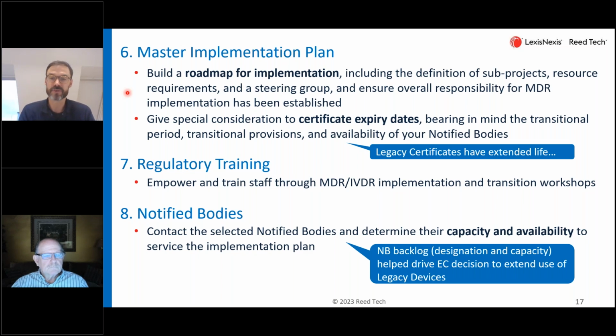So there will definitely be a lot of sub-projects, and I can probably come up with some departments that I haven't worked with in an MDR implementation, but most of them will be involved in one way or the other. So if you want to steer that through in a good way, of course, involve a steering group that can take those decisions, like in point 5, the stop-go decision for your older or legacy products. You need a setup where you can take those decisions and have that responsibility aligned.